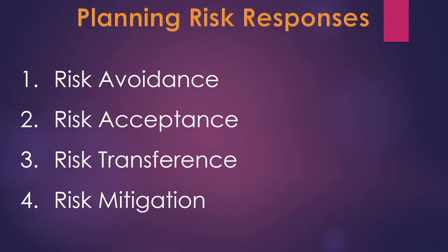Planning risk responses. After an organization identifies and quantifies risks, it must develop an appropriate response to them. Developing a response to risks involves developing options and defining strategies for reducing negative risks and enhancing positive risks. The four basic response strategies for negative risks are risk avoidance, risk acceptance, risk transference, and risk mitigation.